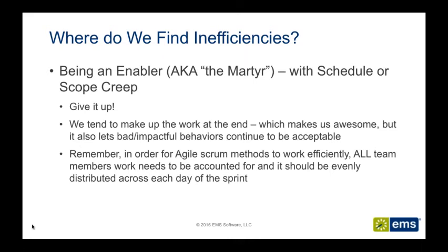And every time we roll over testing work from sprint to sprint, we continue to create a gap and really in some cases a chasm between dev and QE that will be really hard for us to make up when we have multiple sprints. And so by the time we get to the point where we're ready to release, we may have accrued many sprints worth of QA work simply because we are not taking into consideration that blended and evenly distributed hours per day across the sprint.